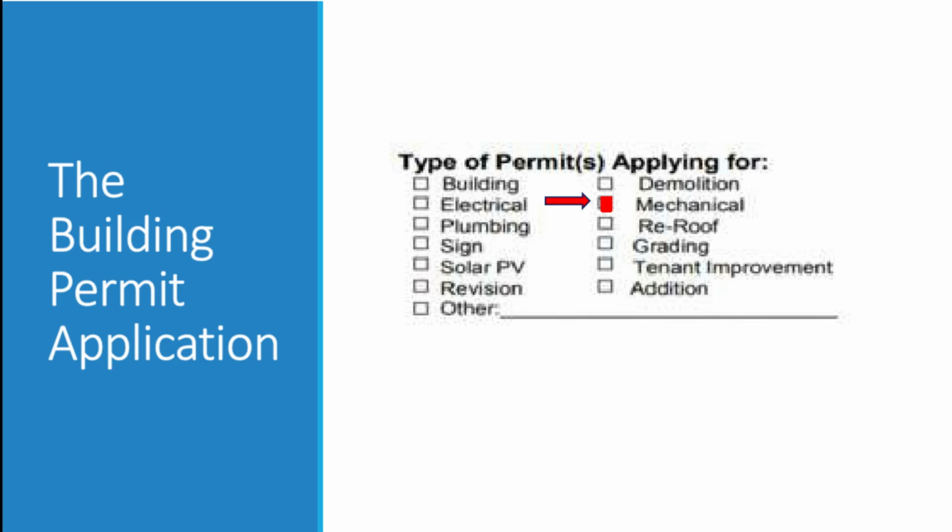If you're submitting for a mechanical permit, such as the replacement of a forced air unit, oftentimes such work requires special paperwork and testing prior to the final inspection. As an example, in California, energy compliance forms are required to be submitted prior to the permit issuance and/or prior to the permit's final sign-off. Contact your local building department for additional information.